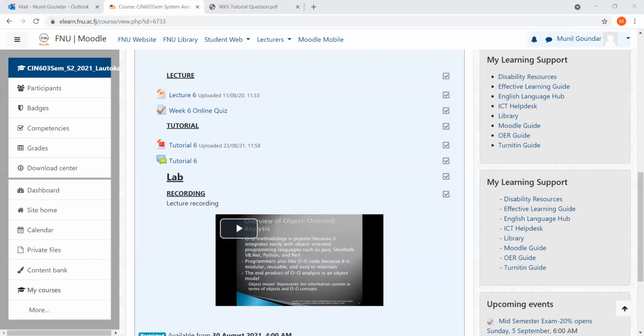Now, what we can do is choose a consistent color all throughout since you are putting in the names for those bars. So let's work on a consistent color. Next one is find necessary resources, from the 5th all the way to the 9th. So I will merge this and apply the color. At the same time, we'll click on the bar and I will write down find necessary resources.